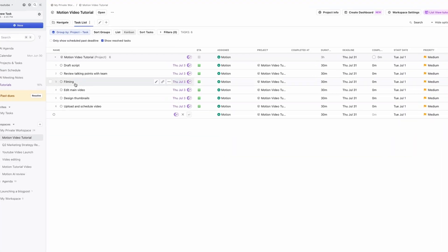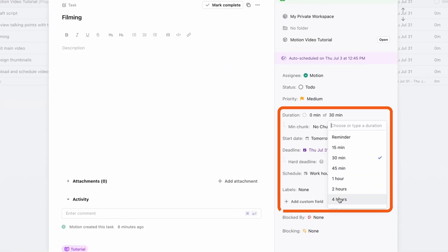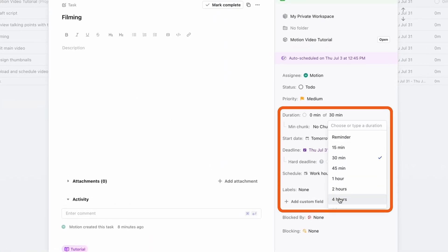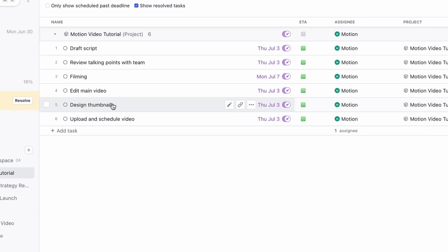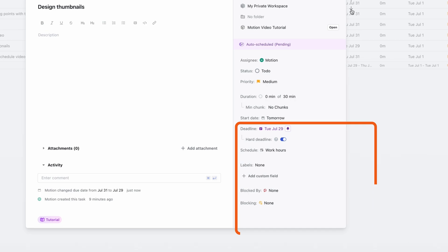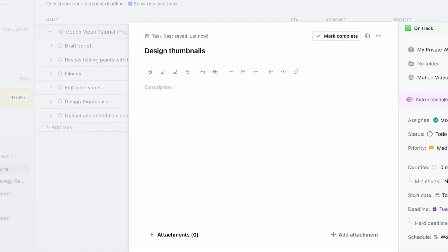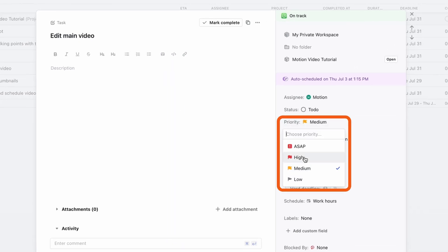For each one, I'm setting a few important details — like how long I think it'll take and when they're due. Let's say filming will take four hours, so I'll set that as the task duration. I'll also add deadlines, like making sure the thumbnail is done two days before launch, and tag priority levels for the most time-sensitive items.